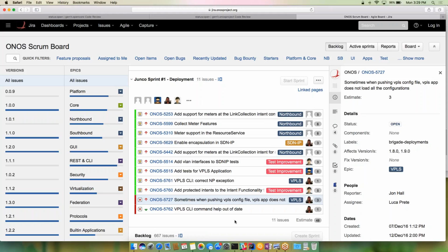No, I agree. I can put the stories as long as we agree that that's the way to go. Till now, we always used the same stories to include the review. So in my mind, the review is a task under the story, right? So 8 story points consider design, implementation, review, merge. Indeed, a story is closed when the code is reviewed, not when it's implemented, right? So if we decide that we need other stories for the reviews, that's fine, but when we pull up the other view that shows it by person, I just want to make sure that Brian knows what he's doing.